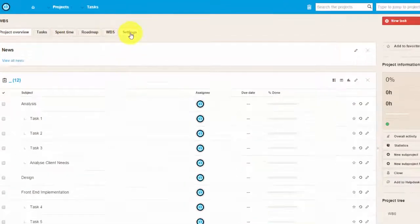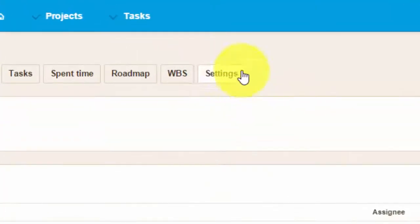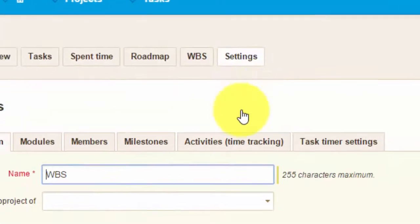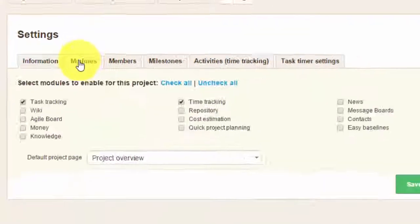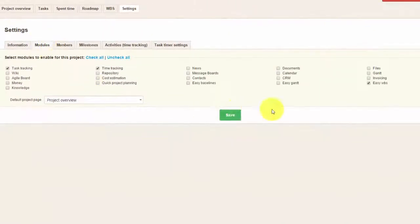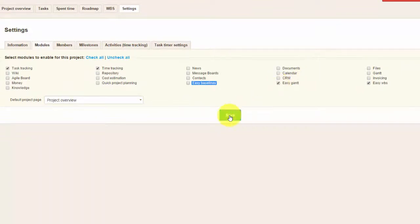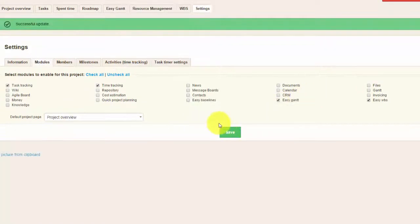First of all, to use Gantt chart, you need to add it in the modules of your project in Project Settings. It will then appear in a tab over here.